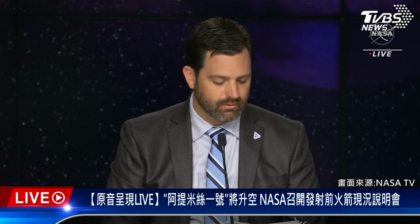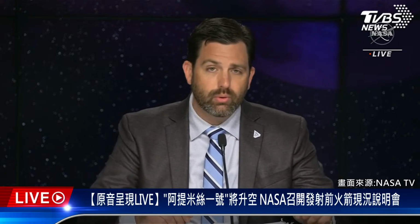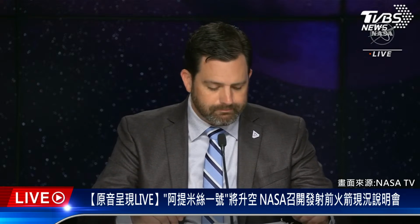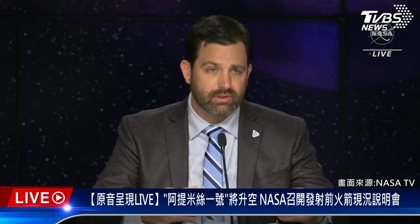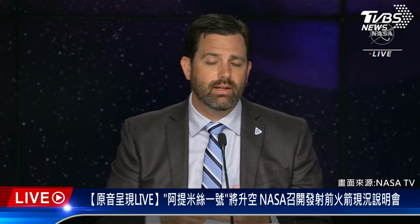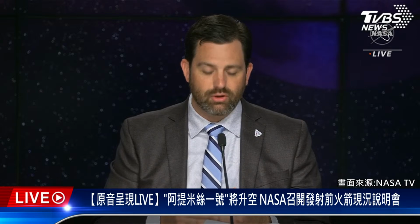When we talk about going into tomorrow and the day of launch, activities pick up really early. So at 2 a.m., we're doing full clearing of the blast danger area. We get into the air to GN2 switch over at about 3:30 a.m. And that allows us to then go into what is called a tanking meeting at 4:45 a.m. And we expect to get a decision coming out of there so we can begin cryo operations at about 5:30. At 8 a.m., you'll expect to get into the engine bleed kickstart.